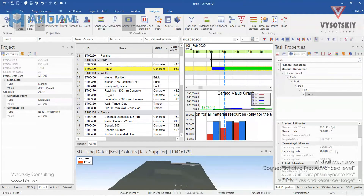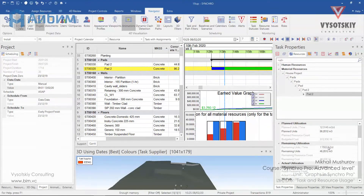And in order to finish this activity on time and within its budget, it's enough to pour 7.7 cubic meters per day. That's how it works.